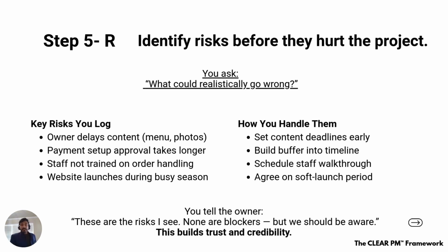You must have a deadline. Hey, you wanted the website by March end. To develop this website, my developer needs the menu, images, and all the details by March 5th. If you do not give me that, the project will be delayed by the time that you give us. That's a simple thing. This will be highlighted in your plan and the dependency when you create the plan, either in Microsoft Project or even Excel. You can see clearly that if this task is not completed, you will not be able to deliver the project.